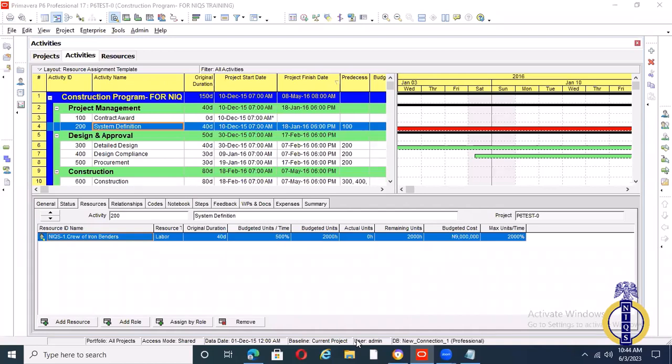So each time you are invoicing, after your valuation is done, your pricing, your BOQ will be prepared in dollars, one currency. But when it comes to payments, the finance bit of it, that is where you split it in two currencies. So my valuation has given me, say, $100 total, cumulative is $100.